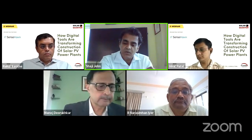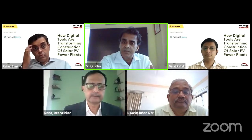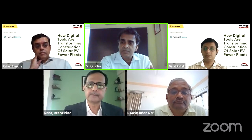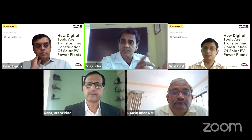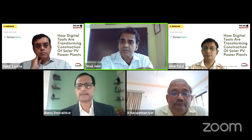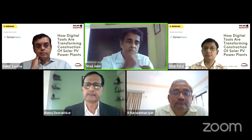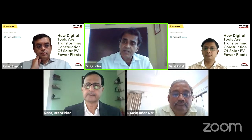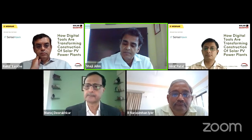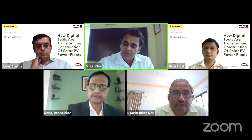Second, as a company as a whole, we have taken an initiative to dig into the big data we have generated over several years. L&T has been implementing EIP, our in-house developed portal for entire construction management processes. Mainly the material and procurement processes have much more data than any other process. So that data is now being picked up, cleaned up, analyzed and thrown back into the system to take the learning and improve our cost structure. That is a big exercise going on right now.